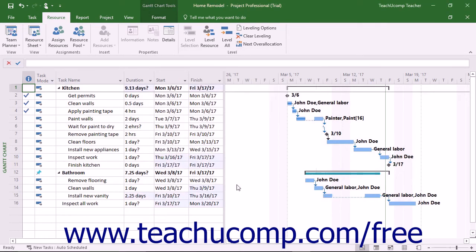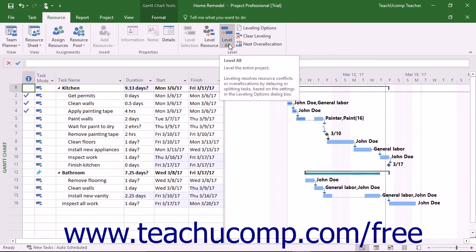Alternatively, you can also level a project file using the current settings in the Resource Leveling dialog box by clicking the Level All button in the Level button group on the Resource tab in the ribbon.